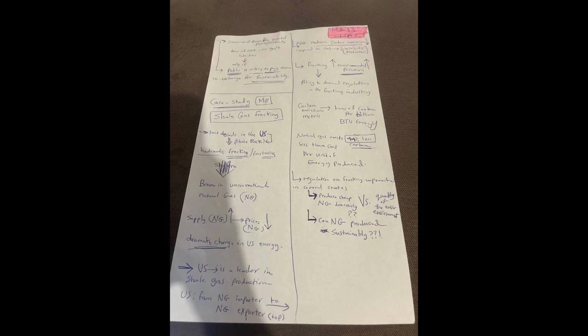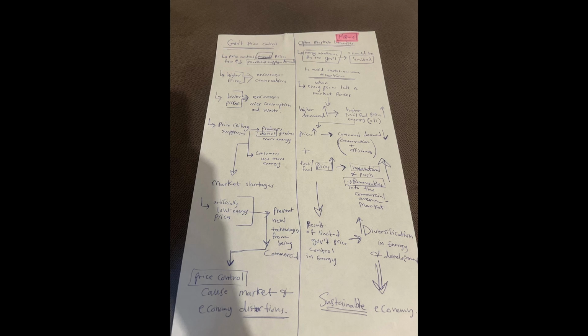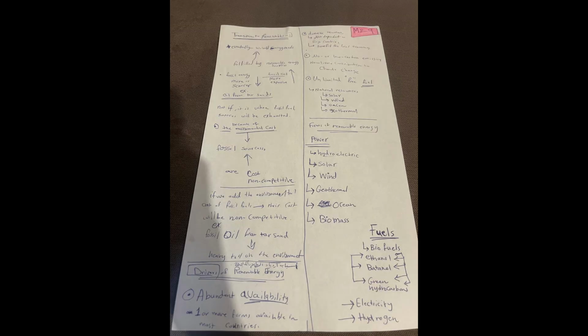Selecting the discount rate, always tricky. Very. It reflects the cost of capital, usually a risk-free rate plus a risk premium. But the rate chosen has a huge impact on the PV, especially for long-term benefits. Higher rates shrink future benefits more. We saw that clearly in problem 2. The project's NPV was positive at 5%, but negative at 10%.